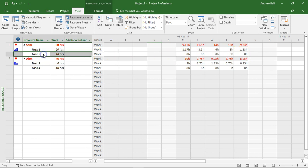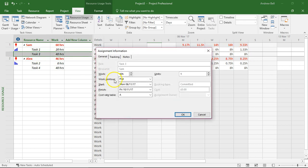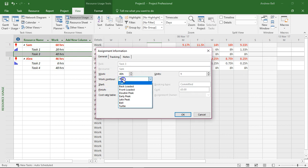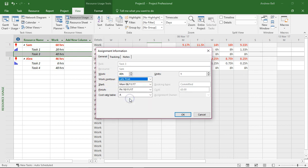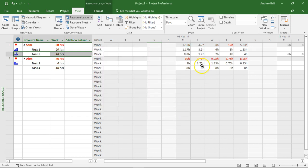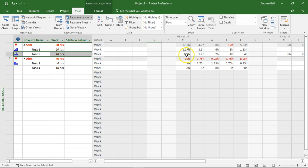But when I change the work contour to something like let's do a late peak on this one. The computer says well if you can do more work at the end to fit it all in I'm actually going to have to increase the duration. So because we're doing so little in days one, two, three and now we're increasing four hours, four hours, six hours, eight hours. Late peak.